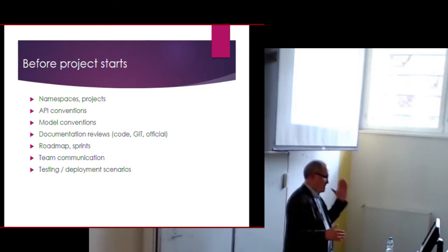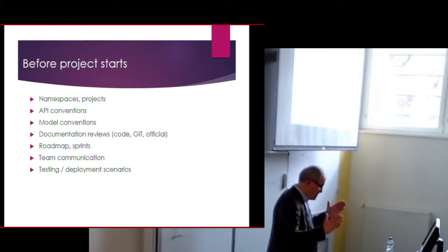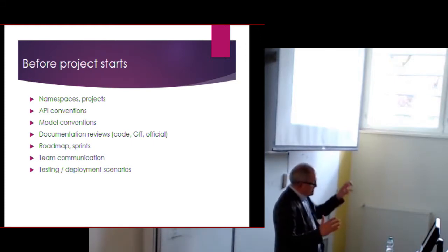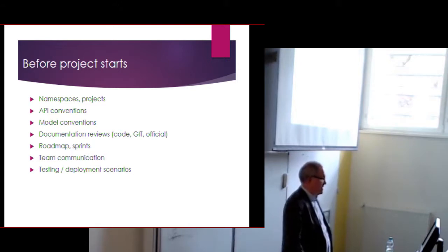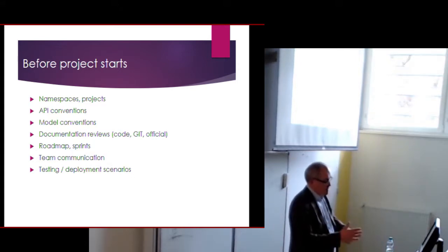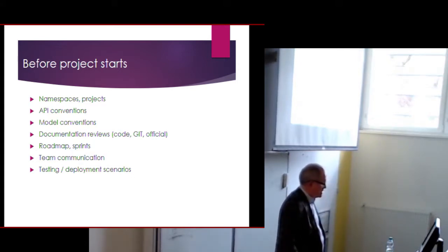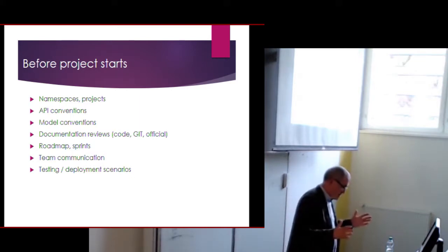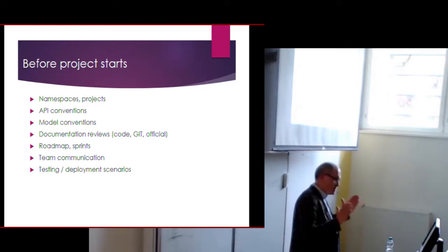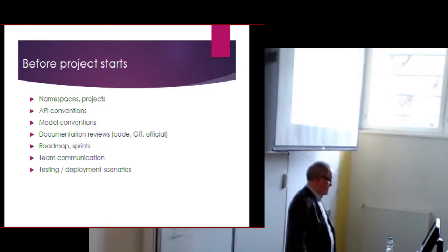It means now we have this state of the system. In 3 weeks we won't be here. We have a number of such tasks, and we start today. And in 3 weeks, all tasks should be moved to the ready state. If not, they are moved to the next sprint. So this approach is known as Kanban, and these small chunks are known as sprints.